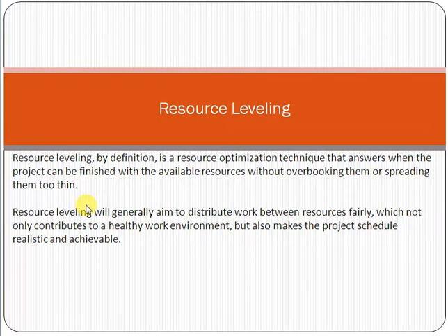That means, friend, the main concept of resource leveling is that you are utilizing the resources and they should not be overloaded or underloaded. The load should be balanced with respect to their capacity. It should not happen that one resource is overloaded, say 200% overloaded, and another resource is underloaded, with only 50% or 20% utilization. So resource leveling generally aims to distribute work between resources fairly, which not only contributes to a healthy work environment but also makes the project schedule realistic and achievable.